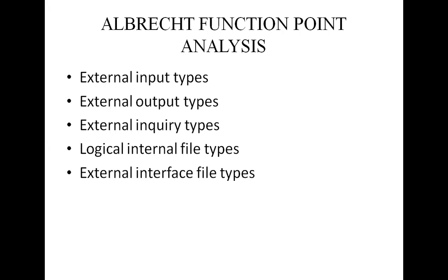It's a functional size measurement. It assesses the functionality delivered to the user based on the external view, so it refers to the logical view rather than the physical view. FPA is a tool that determines the size of the project by counting the functions, rather than the lines of code or programming language. It checks whether the functions match the requirements.